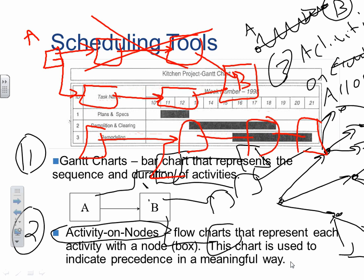Tasks can have start-to-start or start-to-end or end-to-start relationships. When one task ends, the next task can start. If you have two separate tasks with two different resources including two different people, they can be done simultaneously. But if the second task depends on the first being completed, then the same group finishes task one before moving to task two, or a different group waits for group one to finish.